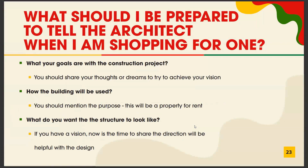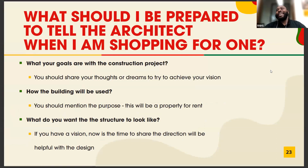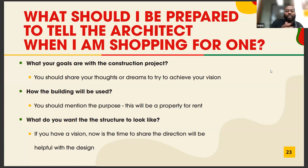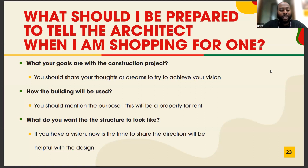A participant asked what a design-build team consists of. It typically includes the general contractor, the architect, and subcontractors like a project engineer — all part of one organization. When all these professionals work under the same company, the individual line item costs tend to be lower than if you hire two separate organizations: one for the general contractor and another separately for the architect.